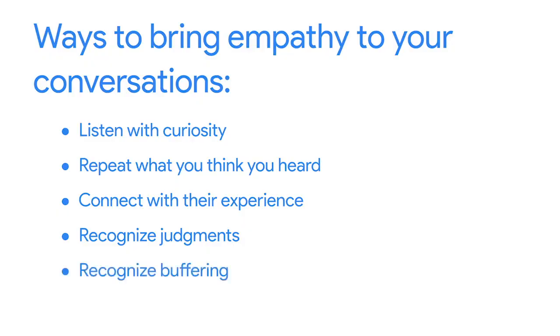Another strategy for practicing empathy is recognizing buffering. A team member might add a buffer to their time estimate for a task without communicating why they added the buffer. Ask them upfront if they've included a buffer to account for holidays, sickness, childcare, or emergencies. This can demonstrate your empathy for their situation and can also help you get a more accurate estimate. Encourage them to open up about this extra buffer by assuring them that you want an honest answer, even if it's not ideal.